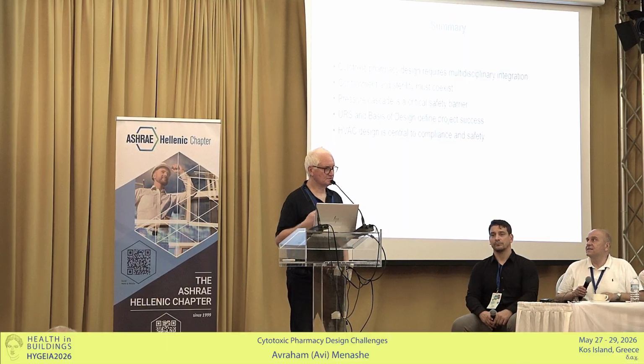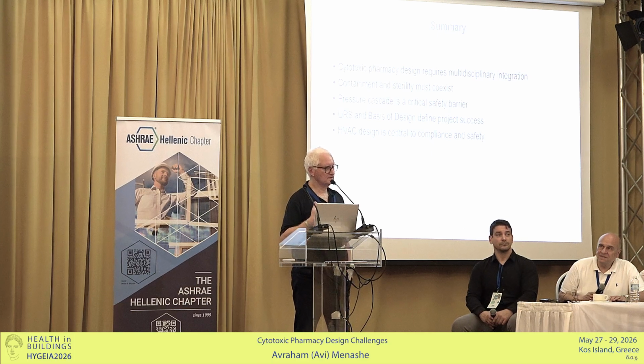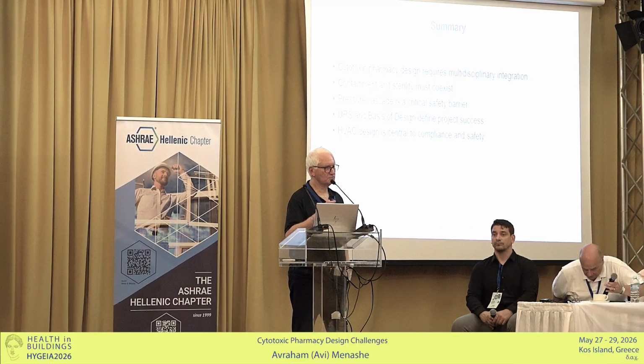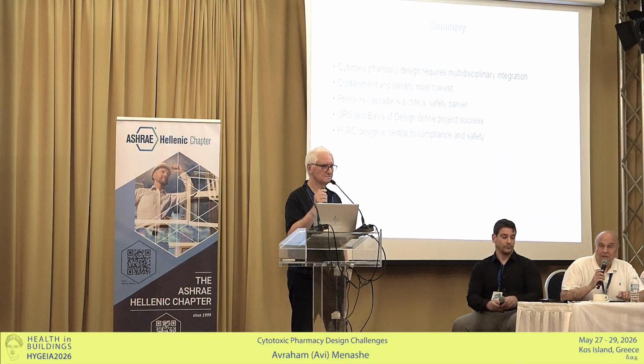It's a protocol that the client writes before we start the design. In this URS they put all the requirements, the design conditions, the pressure cascade, whatever you think, as you, the doctor, are doing the job, and we give the solution according to the URS. We give the BOD, and these are two important protocols that you have to keep. If you are going to change the URS, somebody is authorized to do it; not everybody can do it. Thank you so much.